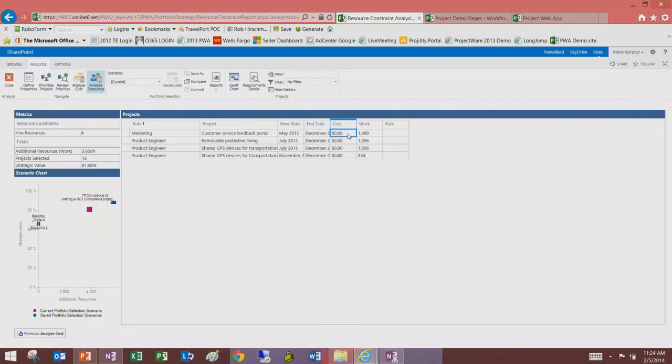So that I can say, I know I've got a $15 million portfolio, but to do those other 3 projects staffing-wise, I need to add another $280,000 in cost to that. I can have a really complete discussion with my management team about resources and cost to wrap up the discussion on the portfolio. It's going to tell us we need product engineers on 2 or 3 of our other projects. How many hours? And on some of these, it may be a part-time role. Maybe I can outsource that or bring a consultant in, right? Other ones, I may bring an FTE in because it's a longer-term need internally. So the portfolio management engine is going to make recommendations for us to help solve some of our challenges here.